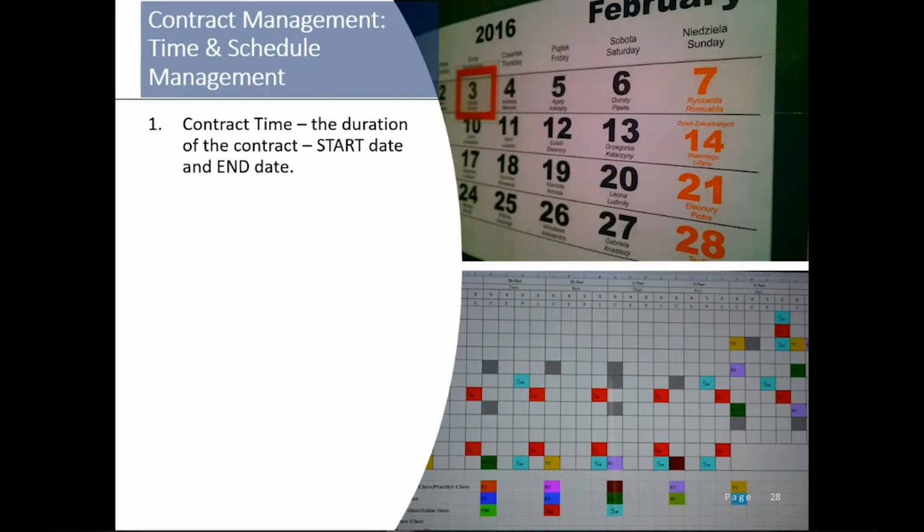Your contract professionals send a notice to proceed to the contractor. You as the contract manager should be copied on that notice to proceed. If you weren't, you should get a copy that says, hey, you can start. Okay. That's different. The contract date is different than the performance date, which is the notice to proceed, right? Till they end their performance.